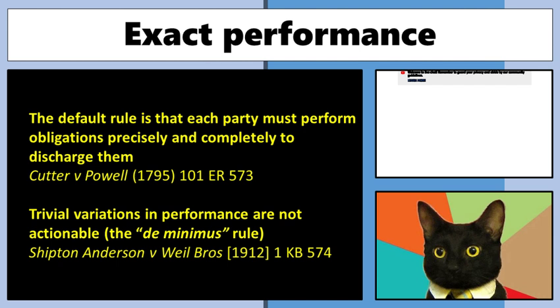This falls under what we call the Latin maxim of de minimis, which is de minimis non curat lex. The court does not concern itself with trifles. It's unusually phrased. It kind of sounds like it contradicts the previous one. But fundamentally, that amount of, as I said, something like 30 pounds, relative to the size of the entire cargo, rendered it utterly trivial.